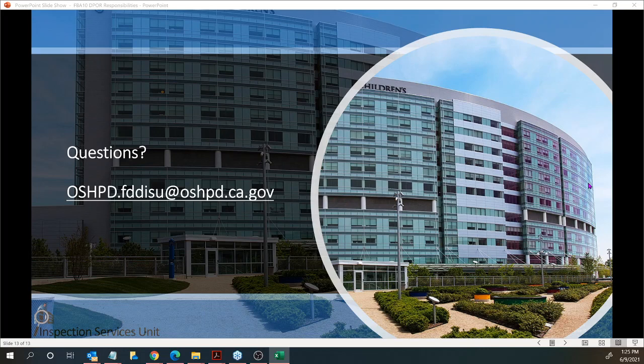Sorry, let me mute myself now. So yeah, like Monica stated, it depends on what the change is. At times, it is a complete redesign, right? Although field staff will like to assist you, our first priority is to observe the work of construction. So we are unlikely to assist you on review of that amended construction document and will refer back to the office. And since you are the AOR, if you are a project participant and you have that PIN to upload documents to our ESP, as soon as you upload an ACD, it will automatically send you a notification on the anticipated target date of the approval. So you can use that as the base of the approval.